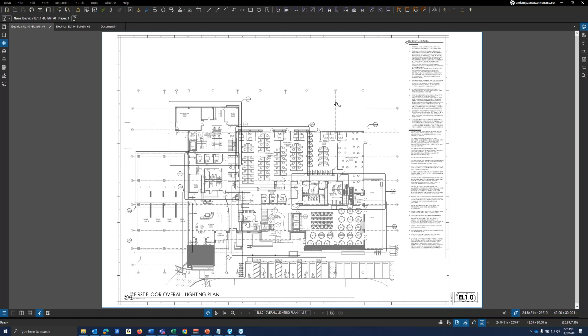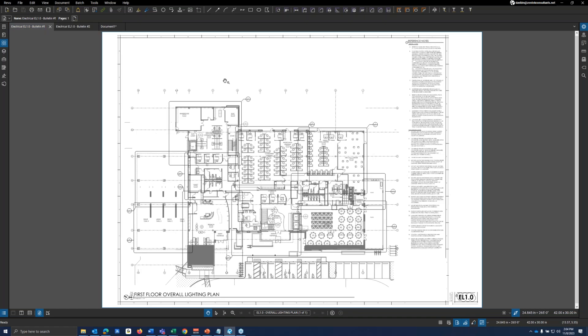However, sometimes we receive a document, whether that be a drawing, a contract or whatever, and it may have changes. And we don't know if it has changes or not because none of them are clouded or it may be missing some clouds as well. So Bluebeam can actually compare two different documents and tell you where the differences are at. So right now on my screen, I just have two different drawings up, one from a Bulletin 1 set and one from the Bulletin 2 sets. The exact same drawing pending the changes.